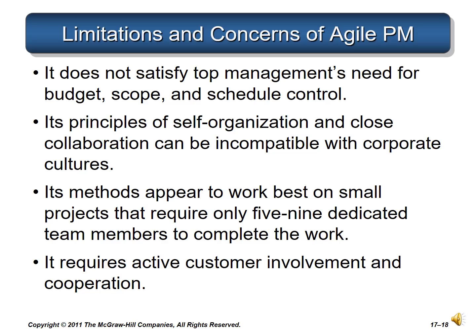In response to the financial concerns, many organizations establish ceilings, which is the maximum budget that should not be exceeded in the development of a given product or service. Even if management totally buys into the value of Agile project management, one cannot simply install it into an organization overnight. It needs to evolve over time. Many of the Agile principles, including self-organization of teams and intense collaboration, are incompatible with many corporate cultures.